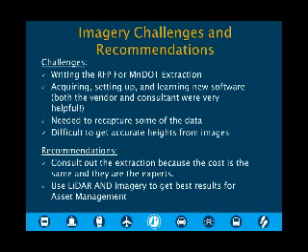We also had a challenge of learning the new software, and it's always difficult, you know, no matter what. So we didn't have that expertise in-house, and so it took us a little bit longer to learn how to use it. Some of the image data that we got had to be recaptured because images were missing and others had sun glare, which, again, DTS did an excellent job, and they said, oh, yeah, you're right, we'll go right back out there and get the data.